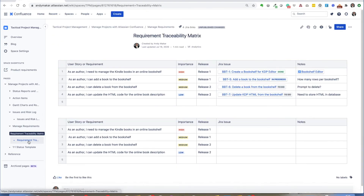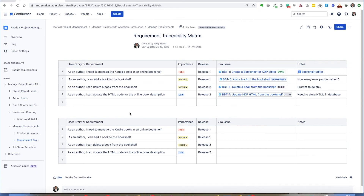Another method I really love is building a requirements traceability matrix. Often with Confluence you're using Jira to track detailed requirements, or if you're running an agile team or a sprint you have a variety of issues listed within Jira. I find it's important to relate that back to a higher level requirements document. When you first start a project you start documenting high level requirements, and you're not ready to put that into a product backlog just yet. You may have a user story writing workshop or a discovery session, and it's not always neat and tidy for where those requirements are going into Jira. So it's helpful to start by summarizing your notes and putting them into a format that people can understand as the high level requirements for the system you're building, and then decompose them as user stories within Jira.